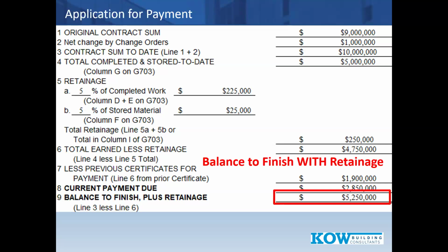So basically, it was a callback. The contractor called the framer, said, you have to come in, you have to fix this. They huffed and puffed. Then they realized it was their fault, and they came in and fixed it. They didn't charge anything because it was their error. There was a nice, clean paper trail to show that it was their error, and they did the work. Without the retainage, that would have been a different conversation potentially.